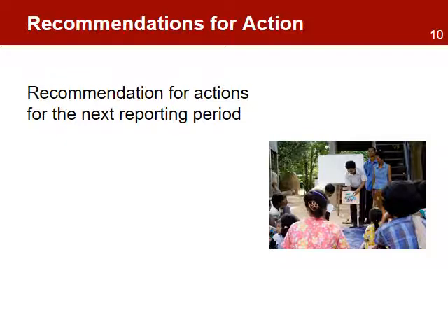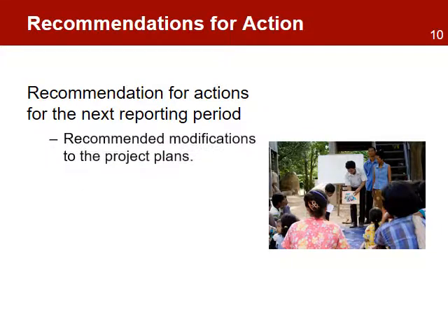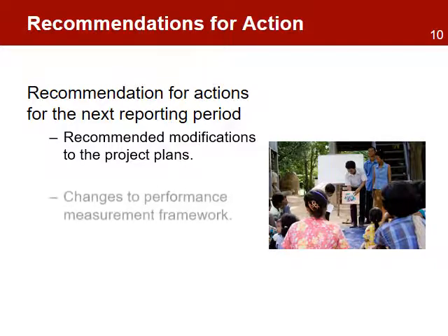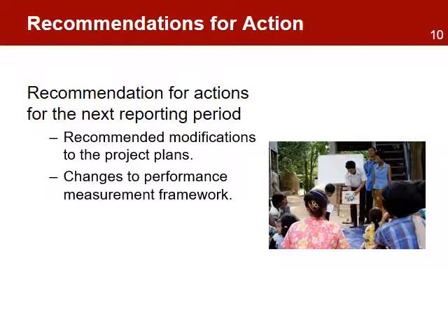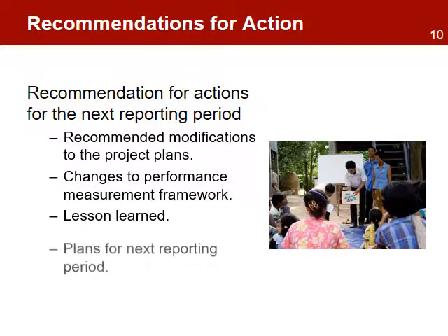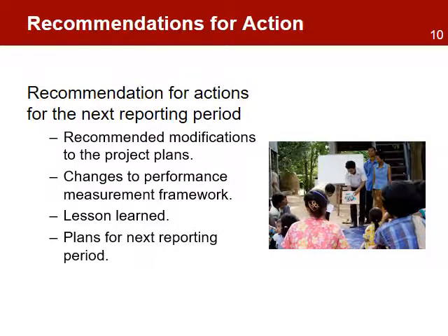The final part of a progress report includes recommendations for modifications to the approved project annual plans, required changes to the performance measuring framework and monitoring plan, and recommended changes to the allocations of resources. The report will also include lessons learned in the areas of achievement of results and plans for the next reporting period.